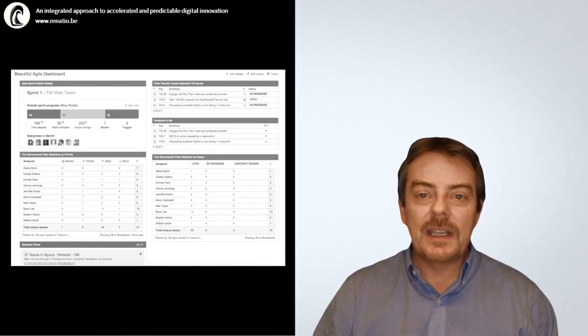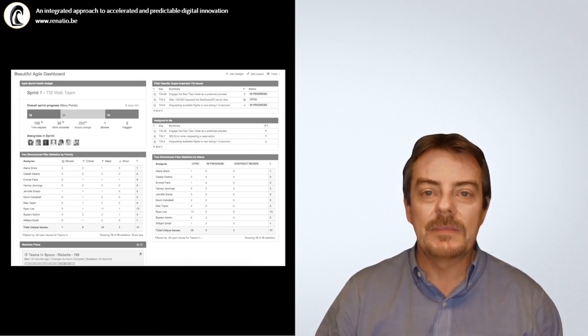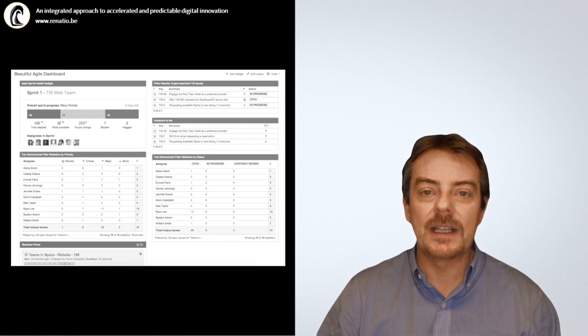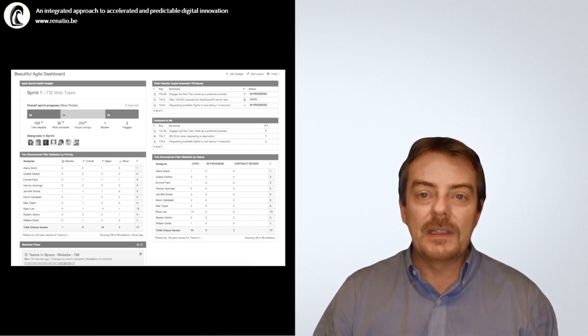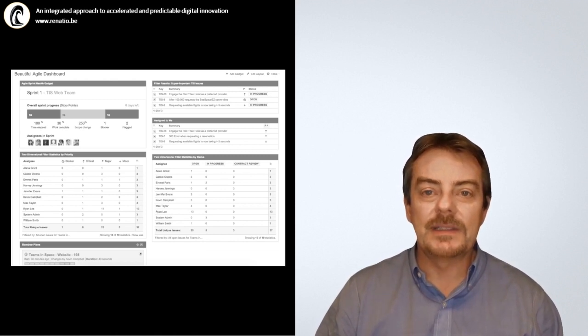Story points are often seen as the obvious way to determine the complexity of a product backlog. Teams also use them to determine their velocity. Velocity as in the amount of story points that a team can finish within a sprint. The sprint being your 2-weekly development cycle. In many cases, management dictates that story points must be used. Reasons are manifold. An attempt for standardization, time tracking, measuring the team's performance, comparing teams.